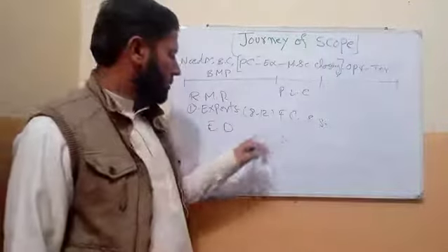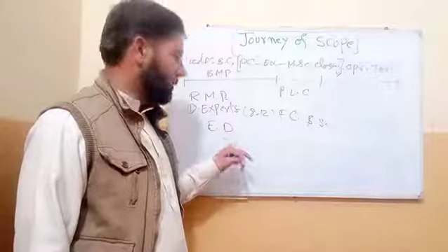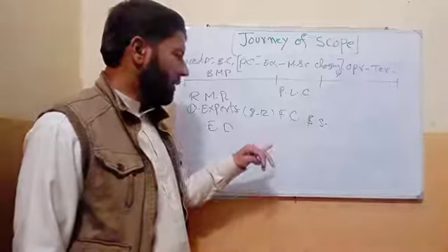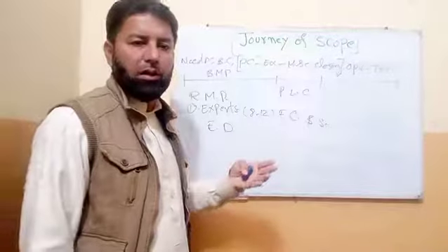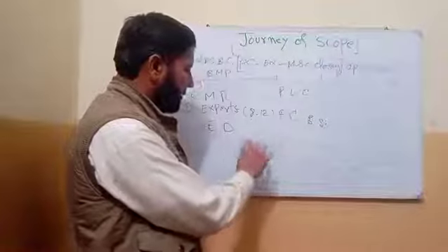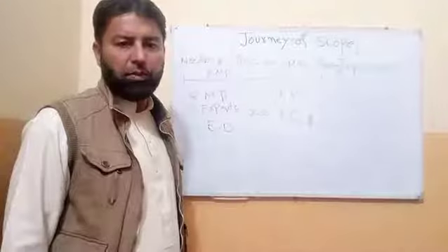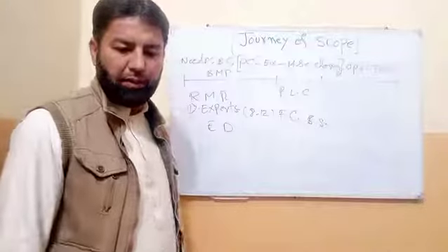We classify those ideas in an affinity diagram. We take sticky notes and put the ideas randomly, with no ordering. Under one or two headings, we separate those requirements or ideas.